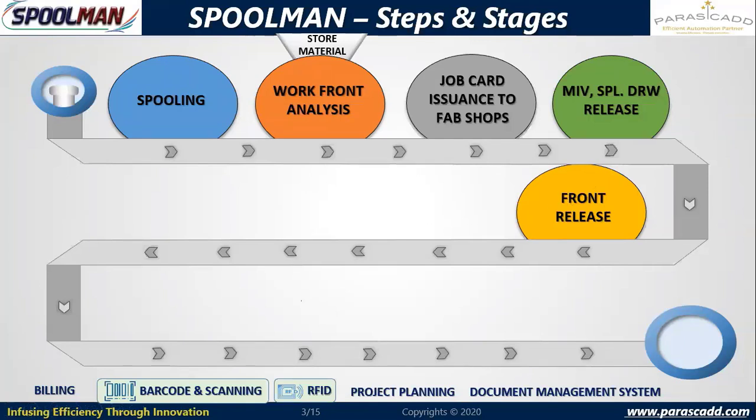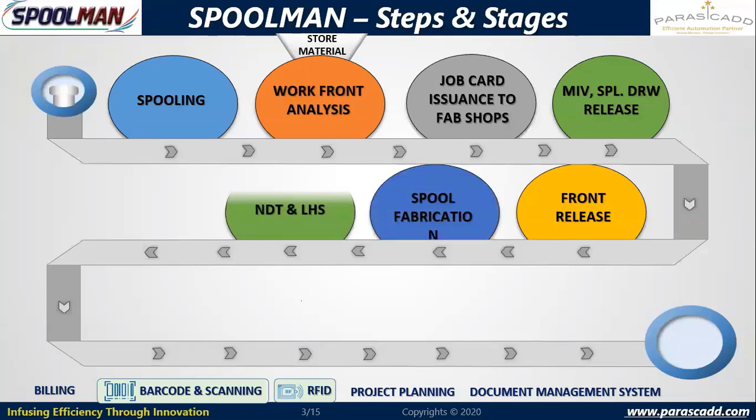So if I'm saying 1500 inch dia job card is issued, then the contractor can 100% fabricate 1500 inch dia without any excuse, because the drawing is there and the material is there, the drawing has been collected and the material has been picked up. Okay, so now I can expect 1500 inch dia without any reasons. So now the spool fabrication will take place.